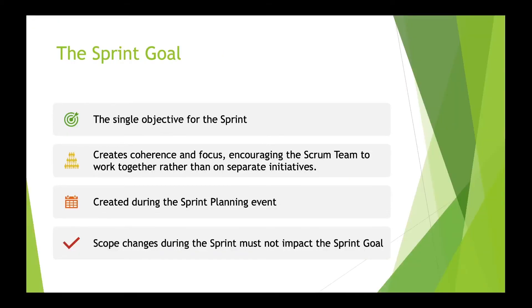Similar to the product goal, the sprint goal provides context to the sprint. It is the single objective for the sprint, created during the sprint planning event and committed to by the team. The intent of the sprint goal is to create coherence and focus for the team as they execute the sprint. If scope changes are injected during the sprint, they must not be accepted if they impact the sprint goal.